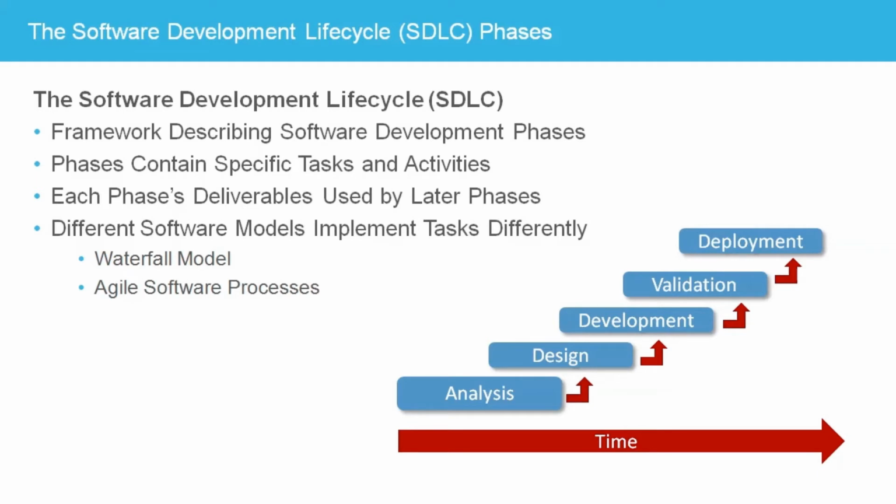During the validation phase, the QA testers exercise the engineering software application by running through their test cases. Test cases will validate the application against the requirements to ensure compliance and identify any defects in the robustness or quality of the software. Validation is conducted by the test or QA team in an environment isolated from the development team. Defects identified are reported to development, which fixes the bugs and returns the updated software to test. When the software is deemed ready for production, the QA team records its findings in the test analysis report.